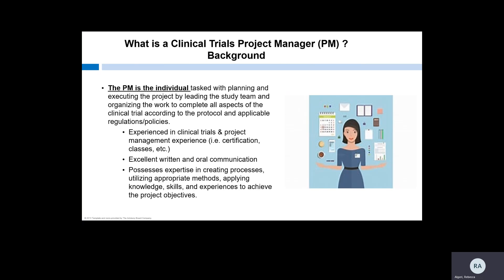The project manager must leverage their knowledge of clinical trials to implement processes that are appropriate to the workflow, to ensure that the trial is conducted efficiently and in compliance with federal regulations and local policies and procedures. For example, if you were working on a clinical trial that required an IND from the FDA, knowing whether the IND needs to be in effect before submitting to the IRB is important to establishing the workflow for study startup. They must also be resourceful and seek education and resources on anything unfamiliar so they can apply that context to the work.